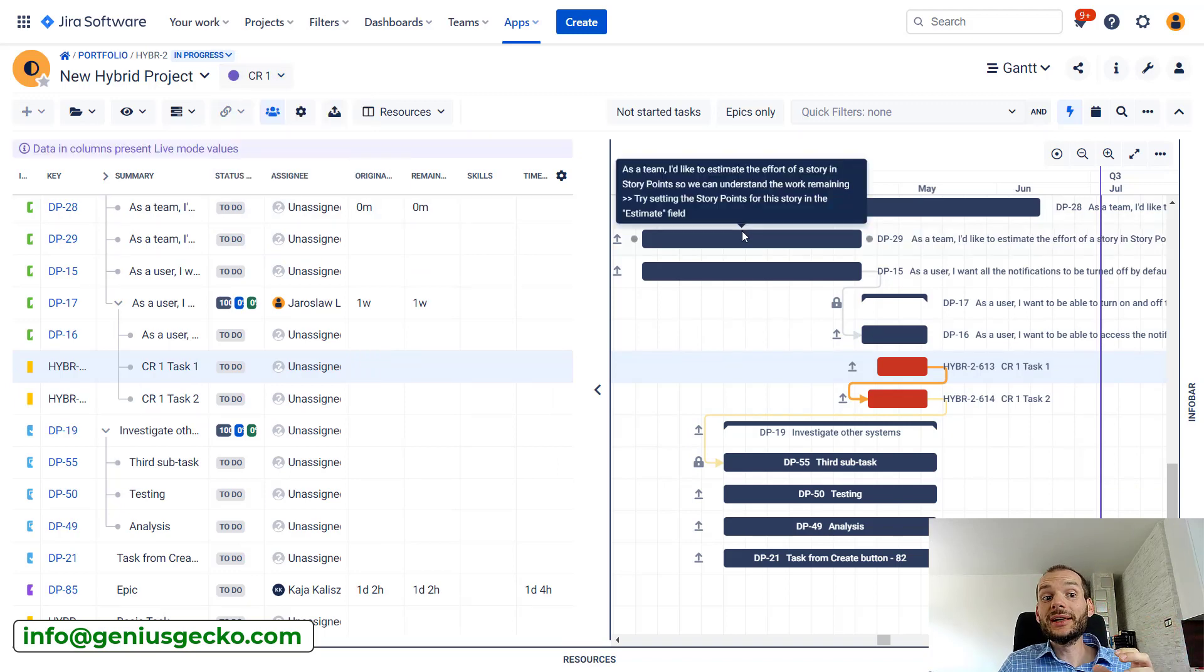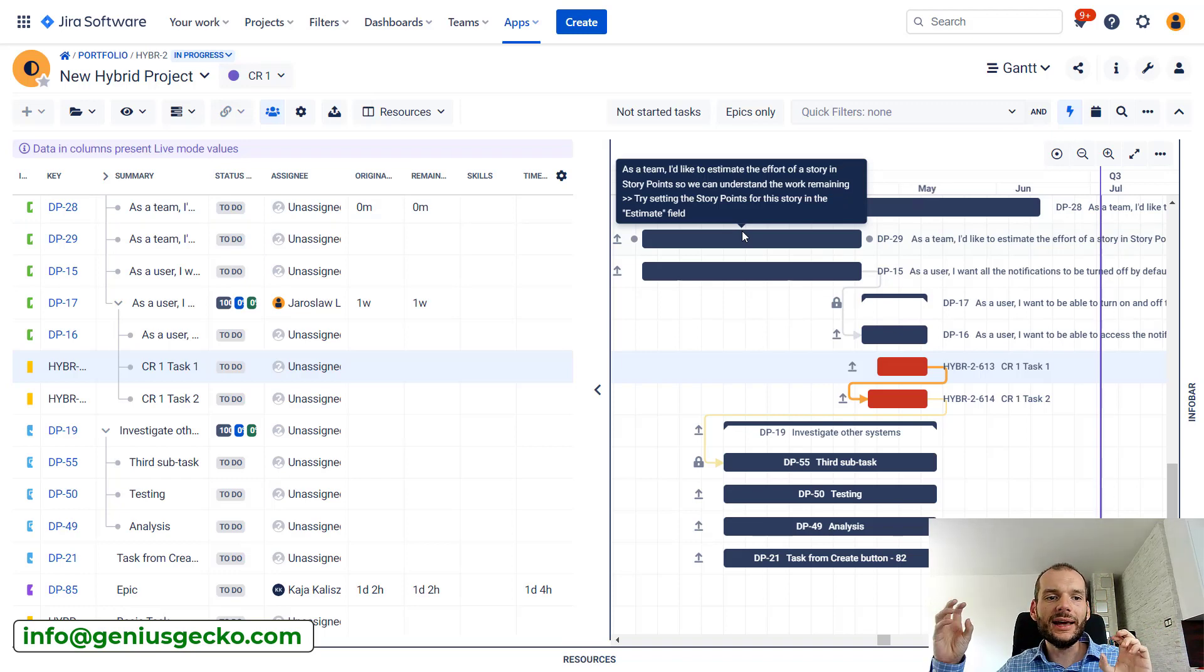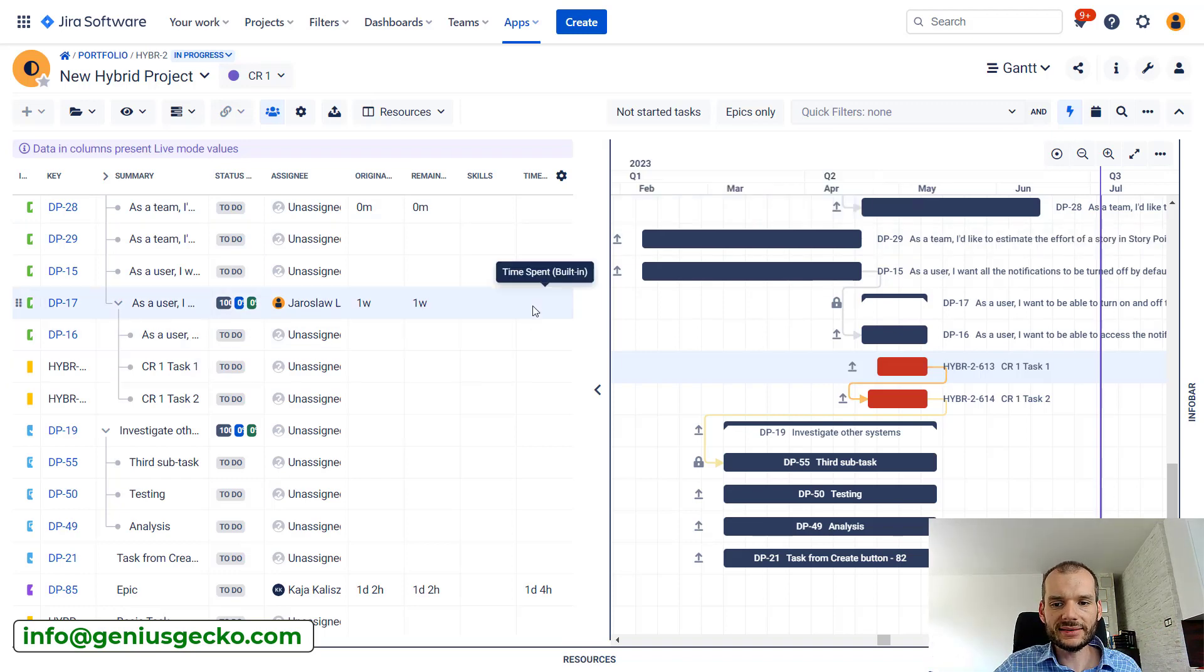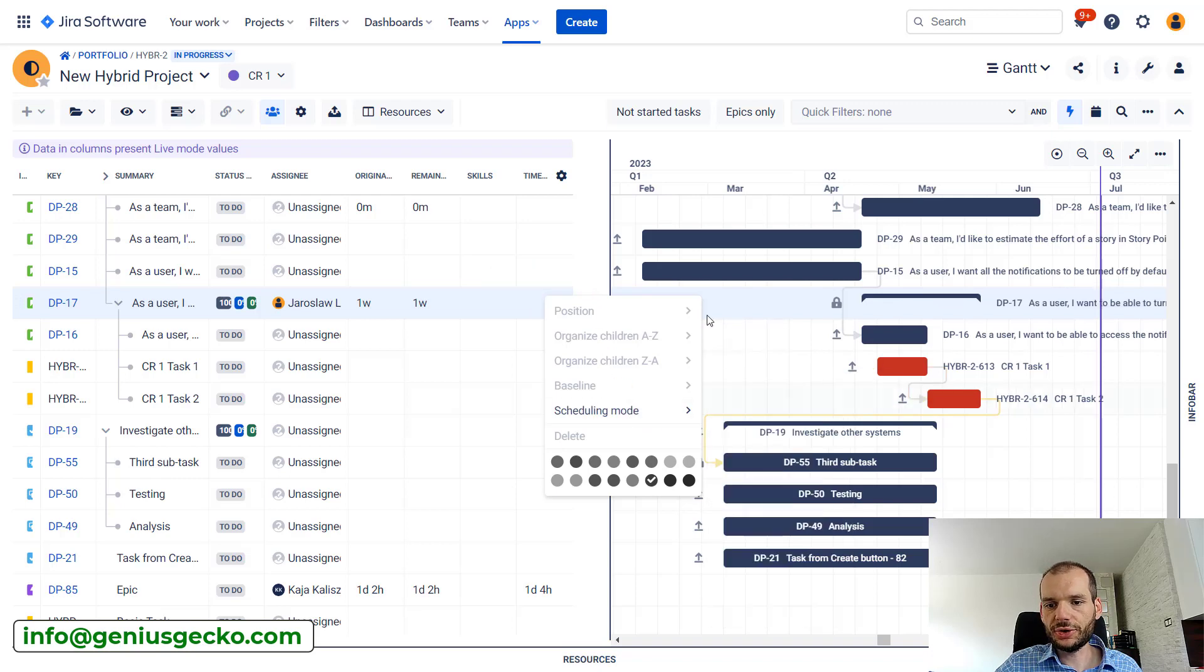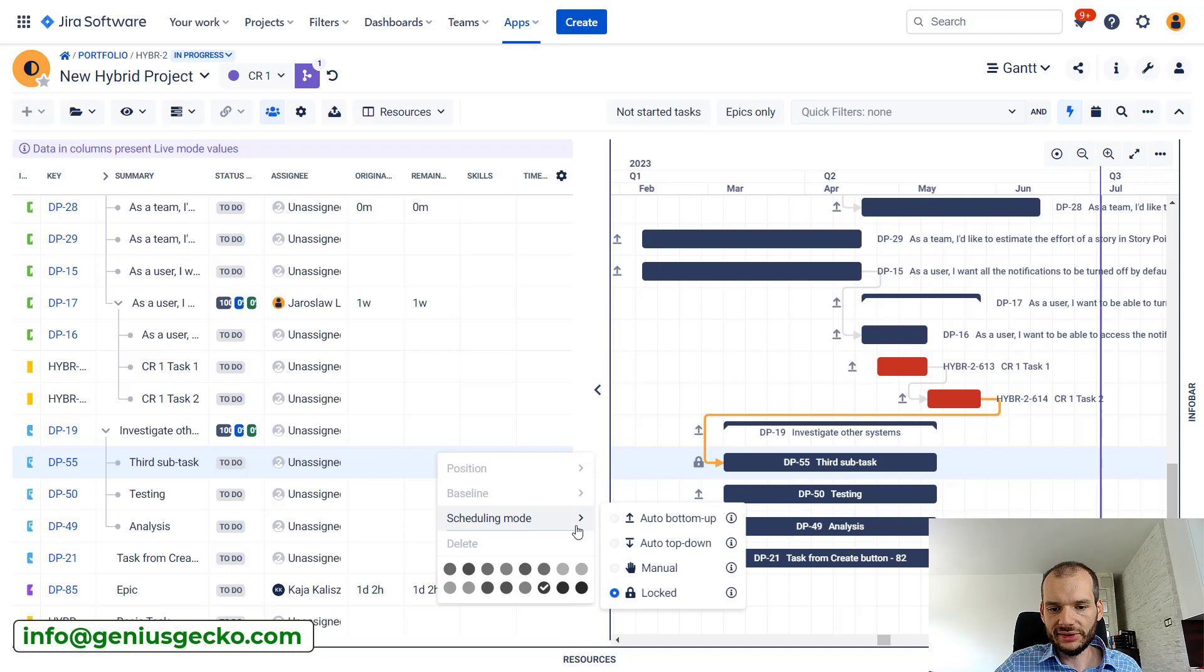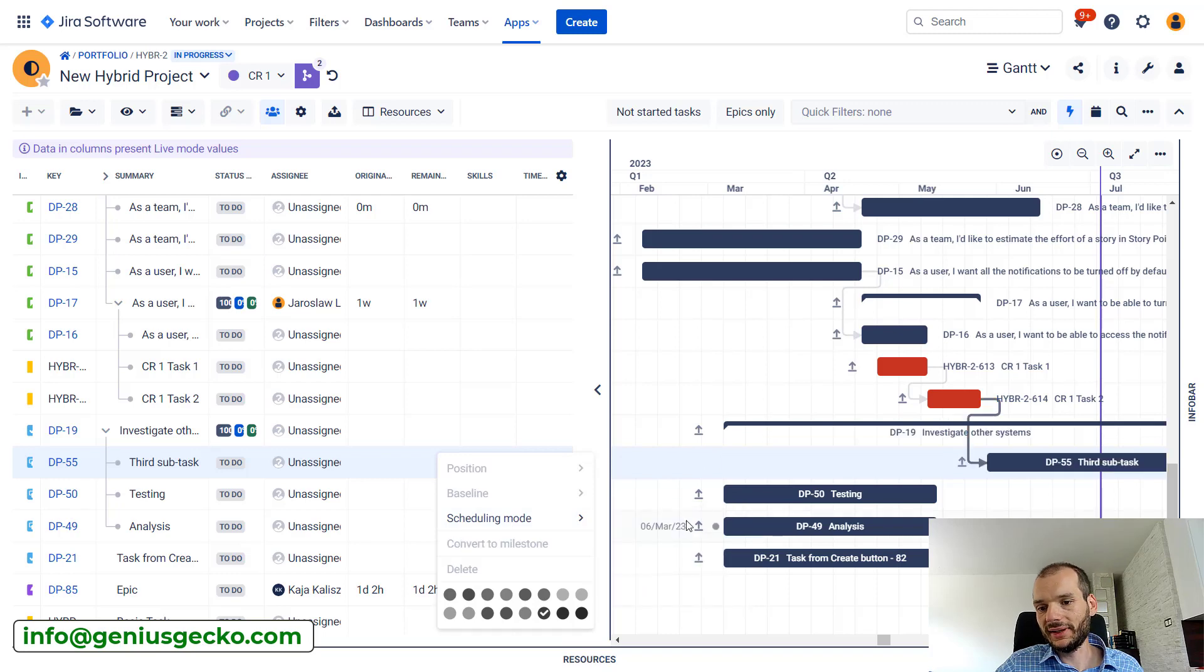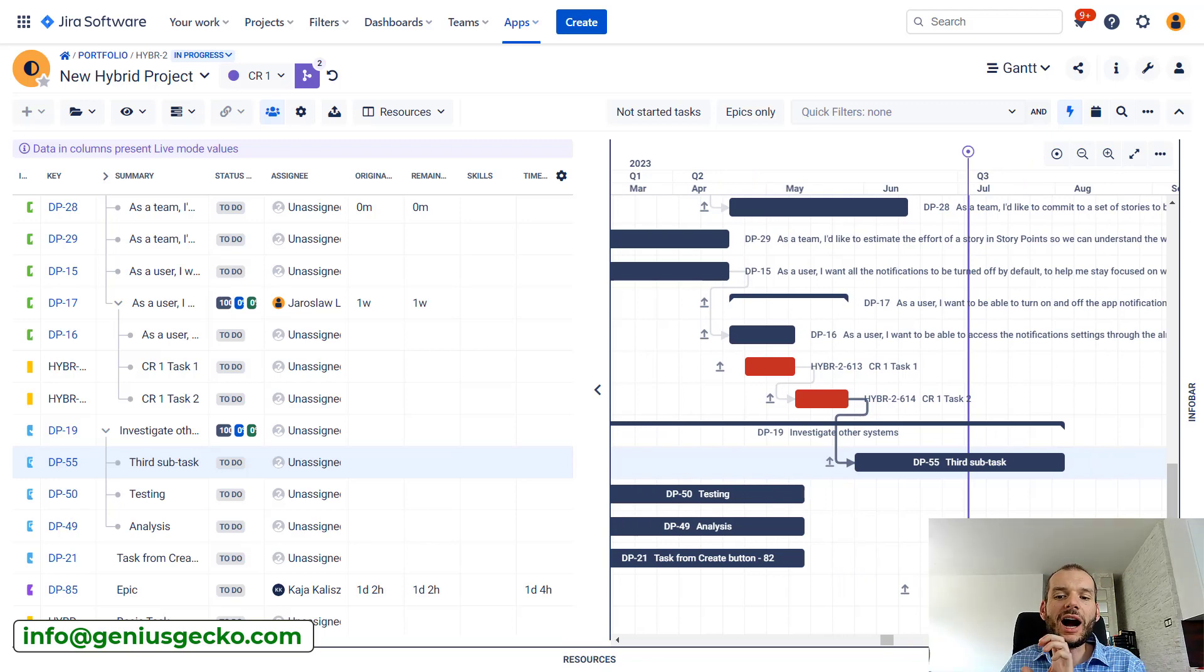And we can start actually doing the planning on the timeline and in the resource module. So let's unlock, change the scheduling mode of the two tasks that I blocked earlier to standard one. And you can see that right away Big Picture automatically updates where they are on the timeline.